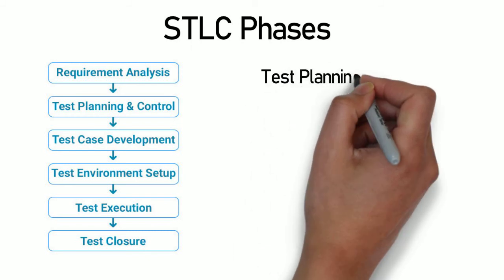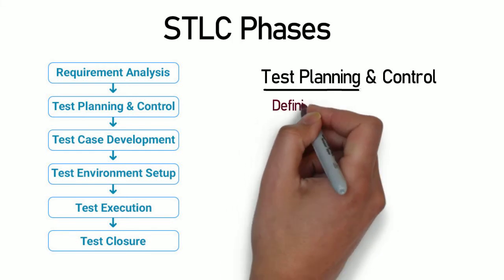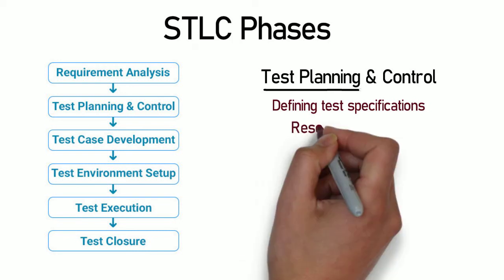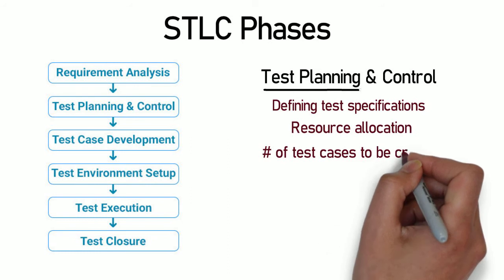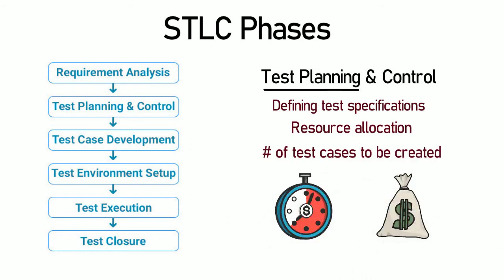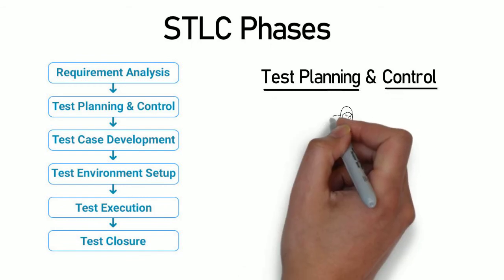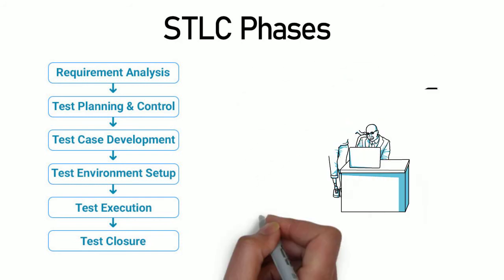Test Planning and Control: test planning is one of the most important activities in the test process. It involves defining the test specifications in order to achieve the project requirements. Here, the resource allocation for carrying out testing, the number of test cases to be created, testing duration, and the cost gets finalized. Test control includes continuous monitoring of the test process with a set plan along with the escalation of any deviation to the concerned stakeholders.